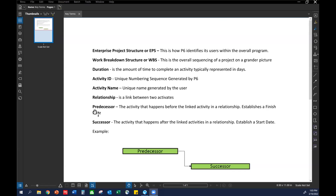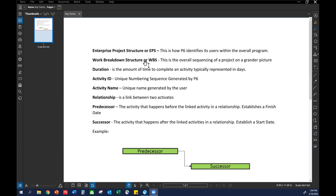Everyone can see a quick glimpse of the definitions that are critical to this point of the project. The first thing is your EPS, or Enterprise Project Structure — this is where you store your projects once we get into P6 itself. From there we're going to start with creating what we call a WBS, or Work Breakdown Structure. That's going to be the real grand picture — the big buckets of items that are going to have the durations and activities inside them. This is really the most important step.